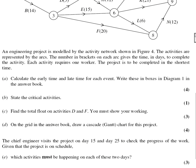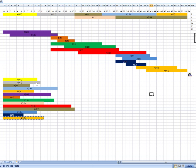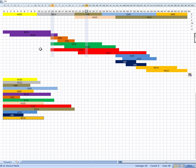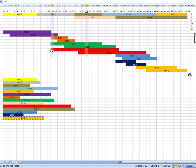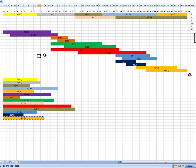The next question that we're asked after we've done the Gantt chart is, the chief engineer is on day 15 and day 25, and we're going to list the activities that must be happening on day 15 and day 25. Now this is where my labeling is not good. Day 15 is actually 14 here, and 25 is actually 24 here. Because this is day 1, it's not day 0. So what must be happening on day 14? Well, C must be happening on day 14. Now B might not be. If it started at 0, it doesn't have to be happening here. D doesn't have to be happening on day 15 either. It could be delayed. E doesn't have to be happening here nor does F. On day 25, G has to be happening, as does H. E definitely has to be happening. No matter where we move these bars, E definitely is happening on day 25. And F is also happening on day 25. This means we need at least 4 different workers.